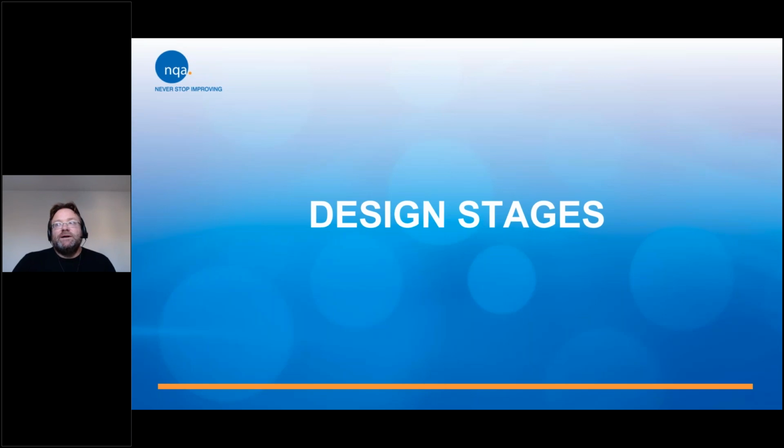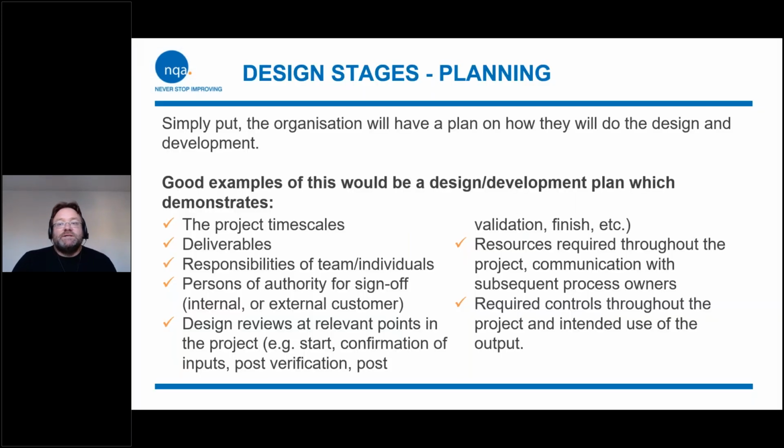So a quick bit then on some of the design stages. These are the design stages from the standard, from clause 8.3. So you've got the planning stage, setting up the whole process and your do's and don'ts and wills and won'ts when it comes to design. So any number of things to be considered in there: project timescales, deliverables, people who are going to be involved, competencies, resources, design review stages, and so on.